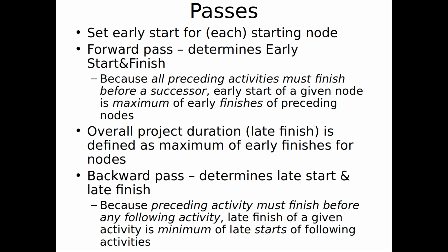In the first one, you're going to be setting the early start for each node, and the early finish is just the early start plus the duration. If this task can't start before day 3, and it's going to take 2 days, it can't finish before day 5. The earliest it can finish is by day 5. Do you appreciate that? Okay.